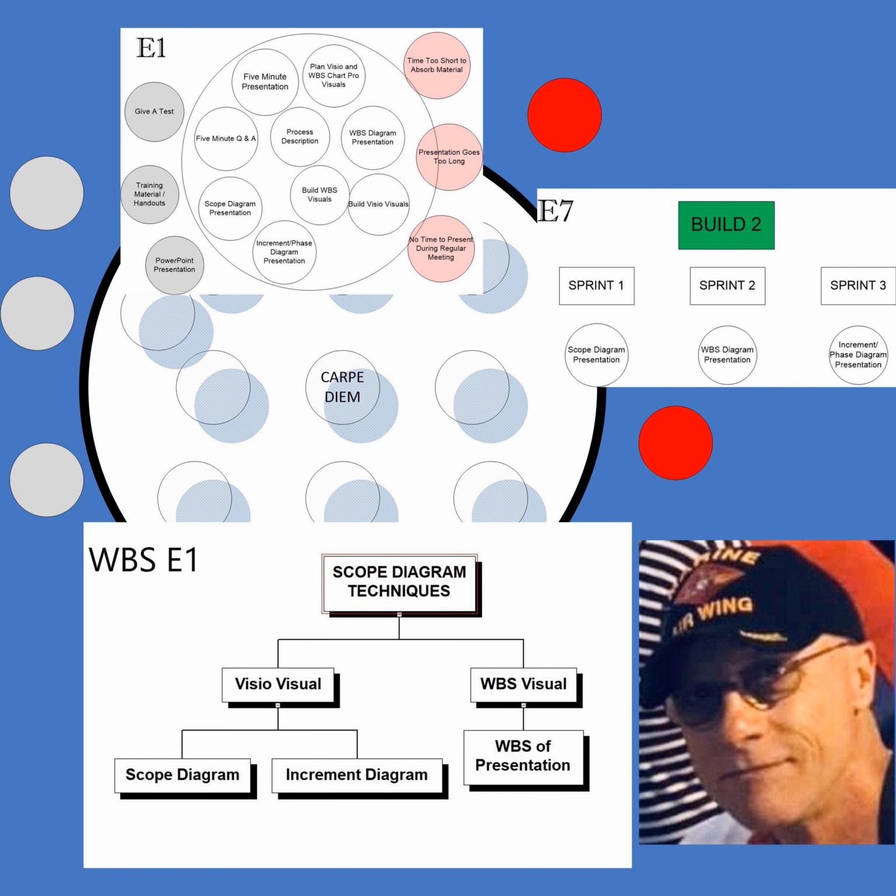So in another tab in Visio, you have these headings. Planning, could be procurement, what you have to procure. If you're not procuring anything, you don't need that. In this data center move, we needed that. Increment 1, increment 2, increment 3, increment 4. These days, it's probably build 1, build 2, build 3, build 4.